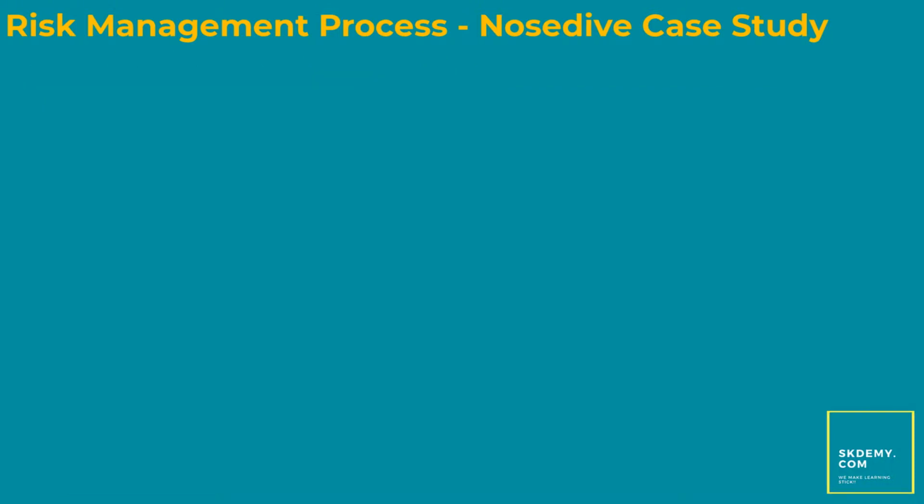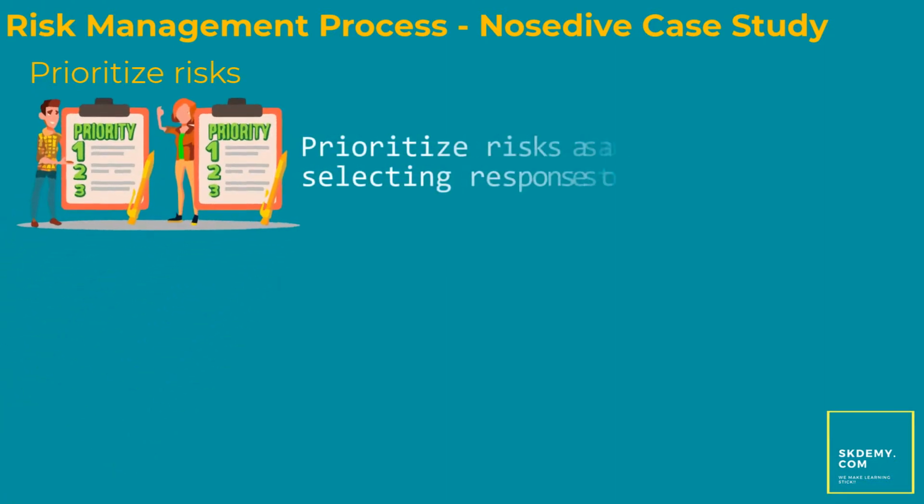Now, once you have all the risks identified, assessed, evaluated and scored, you then need to prioritize which one you want to tackle first and which one later or less. Obviously, the most important reason for prioritizing risk is as a basis for selecting responses. We have discussed some of the most pertinent risk prioritization criteria in the lesson relevant risk terms. It can happen that risks with similar assessments of severity may be prioritized differently. That is, 2 risks may both be assessed as medium, but management may give one more priority.